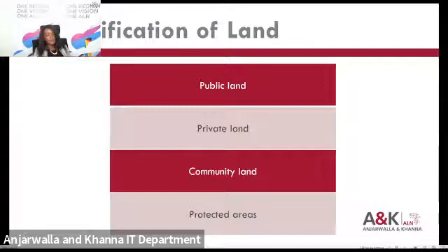When it comes to private land, there are some instances where it does not make commercial or practical sense for a project company to negotiate with each landowner along the route. And in PPP projects, you'll find that the project company that has the award will be in talks with the government for the government to acquire that land for the project.